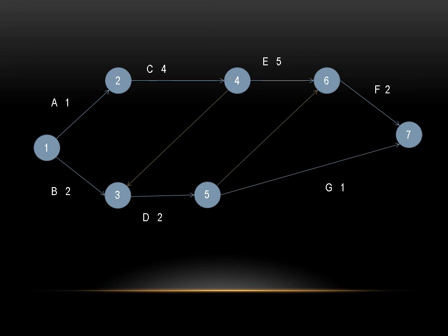If I would have given the arrow from 6 to 5, it would have not followed the table. Like 6 to 5, if the arrow was towards 5, then Z would have been preceded by E and D. That was not true. Z was only preceded by D, and hence it is the final event. We have written it as 5 to 7. Okay, you are clear, I think.